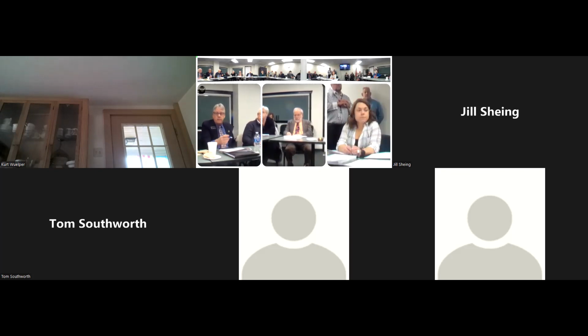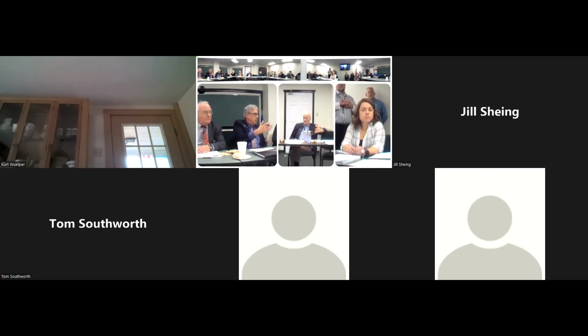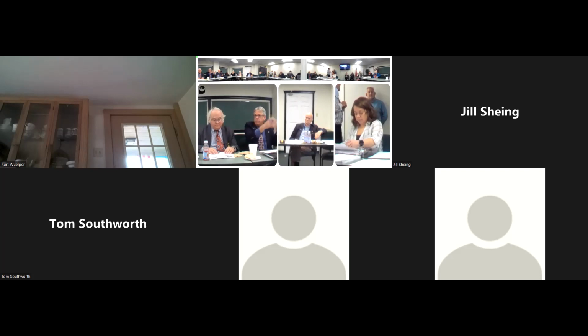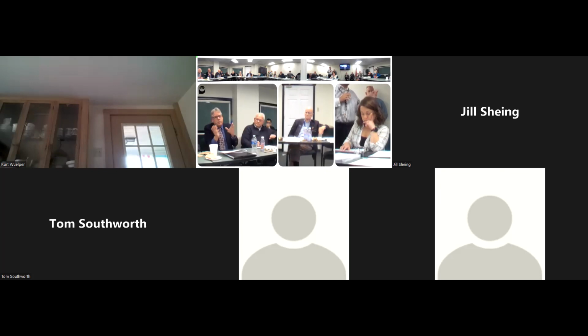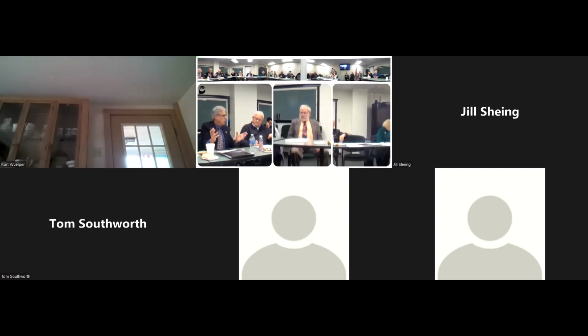What I would like to see is maybe a couple of options in there, because the expandability is important to me as well. I'd like to see them as options, as an a la carte thing. Okay, here's a $140 million project. What if I want to add those foundations back in? What's the cost of that? What's the cost per square foot for that space we're gonna get? We'll have that for you for Monday. Is it worthwhile? Same thing with the road. What's the difference between a 12-foot and a 20-foot road? If we have those as a la carte options, maybe we'll support them, maybe we won't at the time.